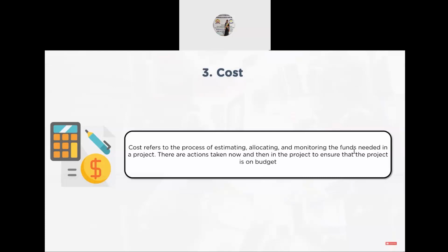Once this estimation and allocation of budget happens, that will become a base, and any deviations from that cannot happen so easily. Any deviations because of additional scope can be handled through change management. But in an ideal scenario, the cost should not escalate or come down. The organization can also set certain tolerances at the project level, considering various scenarios, like risks or something which deviated from the deliverable. To what extent it can deviate, that tolerance will also be set from a monetary value perspective.